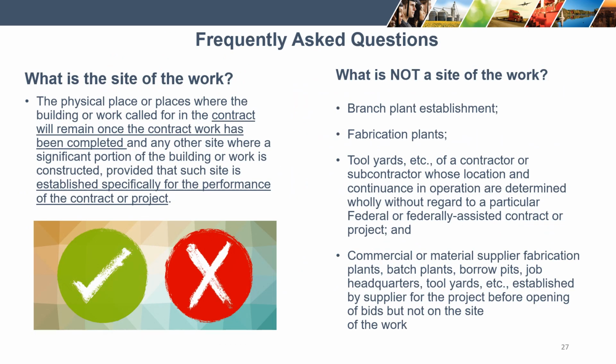Okay, frequently asked questions. What is the site of the work? The physical place or places where the building or work called for in the contract will remain once the contracted work has been completed, and any other site where a significant portion of the building or work is constructed, provided that such site is established specifically for the performance of the contract or project.